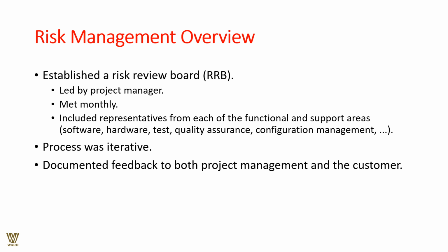Establishing a risk review board, the RRB, led by our project managers, and it should be meeting on a monthly basis. It includes a representative from each of the functional and support areas. Let me talk about software as an example, hardware as an example, test as an example, quality assurance as an example, configuration management as an example.